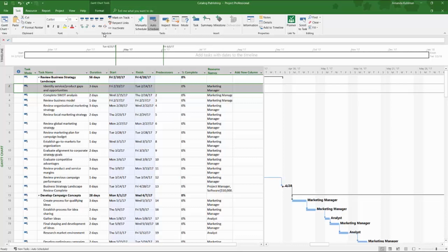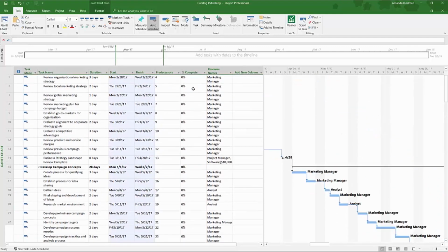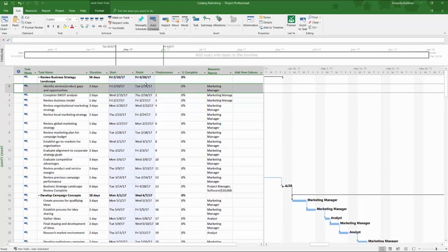This next section here is the schedule section, and this is the most frequently used section in Microsoft Project for updating your task progress. These options up here at the top give you a quick way to update the task progress. You have the option of marking things as 0% complete, 25, 50, 75, or 100% complete. As you can see here, my work breakdown structure in my project schedule has 0% complete. There has been no work that has been assigned to this task.